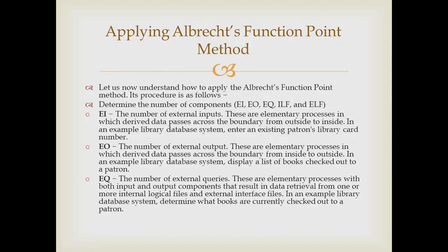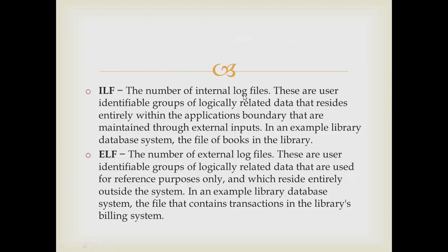Next is how we can apply this. Let us know about the Albrecht function point. Determine the number of components, that is EI, EO, EQ, ILF, and ELF. EI is external input, EO is external output, EQ is external query, ILF is internal log files, and ELF is external log files.